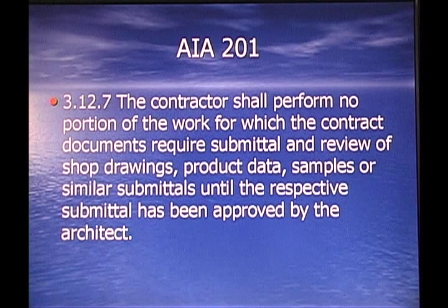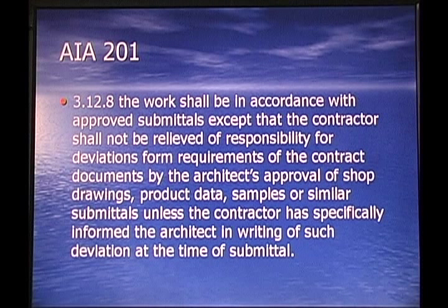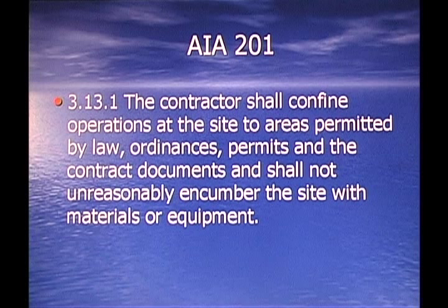3.12.7, the contractor shall perform no portion of the work for which the contract documents require submittal and review of shop drawings, product data, samples, or similar submittals until the respective submittals have been approved by the architect. 3.12.8, the work shall be in accordance with approved submittals, except that the contractor shall not be relieved of responsibility for deviations from requirements of the contract documents by the architect's approval of shop drawings, product data, samples, or similar submittals unless the contractor has specifically informed the architect in writing of such deviation at the time of submittal.